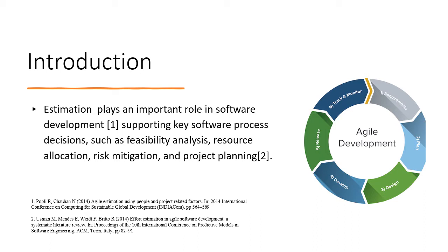There are challenges in estimation, such as requirements constantly changing during the project, which results in inaccuracy in estimation. Also, it is hard to estimate unknown parts in the development process, which has also driven the movements of #NoEstimates and #NoProject. Both movements are related: NoEstimates removes the justification of estimation and helps organizations focus on value delivery first, whereas NoProject is an agile approach towards continuous and market-validated value delivery.